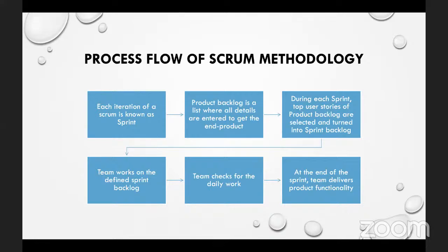So in Scrum methodology, we have what we call sprints, right? You guys started hearing or started learning about sprint, I think when we started from Monday. So we have sprints, right? And what are sprints? It's a set of iterations, like a 2 weeks iteration. It depends on the company or the organization that you're working for. Sometimes a sprint can be 4 weeks, right? And pretty much, I believe, that is a max. We cannot have more than 4 weeks of sprint.